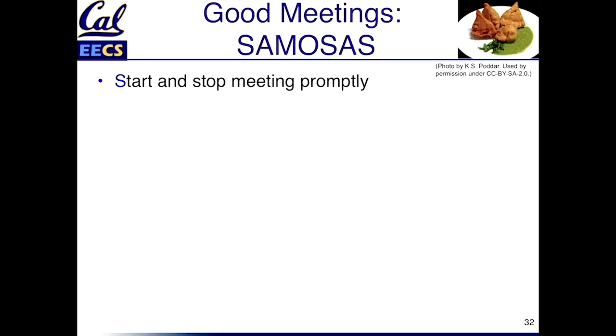Here when we have meetings at Berkeley, there's this idea of Berkeley time, 10 minutes after the hour. At Harvard, where I was just visiting, there's Harvard time, which is 7 minutes after the hour. So when you say 10 o'clock, it's 10:07. So pick a number like 10:09, right? There's no argument what time 10:09 is. 10:09 is 10:09. It's not rounded up from there. And that's what happens in the Scrum model. You pick an exact time, everybody shows up the same day at that time, and you have a short stand-up meeting. Well, for sit-down meetings, you still want to have a sharp starting time so nobody wastes their time getting there.